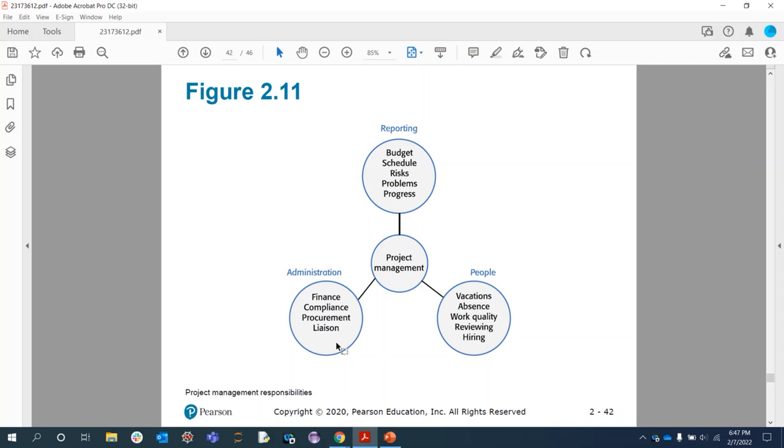A centralized system of contract change monitoring and control will be used to evaluate and determine whether a potential change to contracts is needed. There are formal physical inspections and reviews of procurement operations in order to generate the performance report, which can provide real-time feedback. So the administration process is extremely important, and it's usually managed through supply chain or project management software.